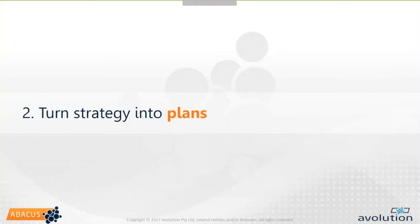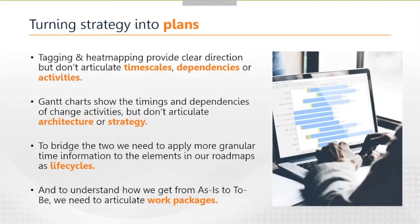As Tim alluded to, heat mapping gives you the 'what' — it tells you basically what your strategic intent is. But it doesn't provide any view of time scales, dependencies, or activities. In the classic sense, that's what something like a Gantt chart does — a Gantt chart will show you those tasks and dependencies. The flip side is a Gantt chart doesn't give you any view of the architecture. So we need a bridging artefact that can represent our architecture in more of a plan-based view, and there are a couple of ways we can do this.